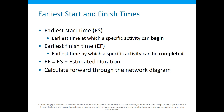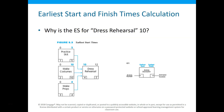So we have a lot of little acronyms. You're going to see ES and EF — earliest start and earliest finish. This is one way we start at a given point and move towards the future. Early finish is our early start time plus how long it's going to take. So, what is the early start for dress rehearsal? Early start is zero, right? But what is our early finish? First we have to find out what the duration of this activity is — five, ten, or four. I'm going to pick ten for the main task and two for dress rehearsal, so this entire activity is going to take twelve units.